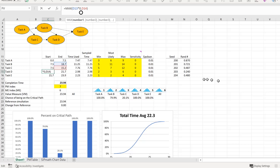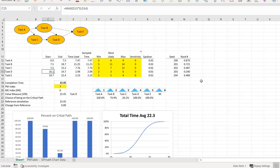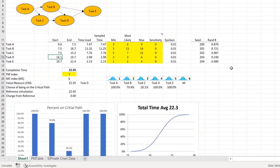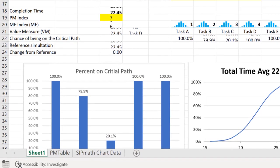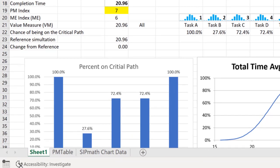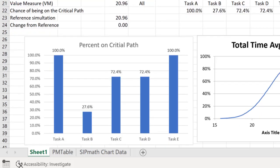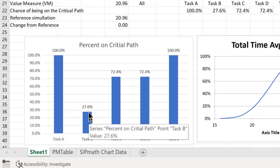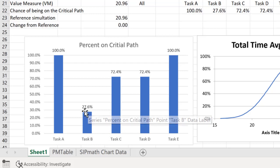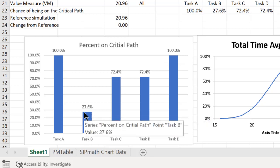Then we're going to hit the enter key. It's going to recalculate. And now, what we find is that task B is only 27.6, task C is 72.4, and task D is no longer 100%, it's 72.4.